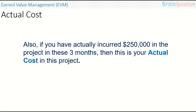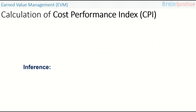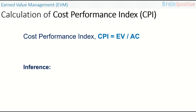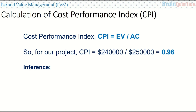If you have actually incurred 250,000 dollars in the project in these 3 months, then this is your actual cost: AC equals 250,000 dollars. From these three parameters — EV, PV, and AC — we can now calculate the Cost Performance Index, which is EV divided by AC. For our project, CPI equals 240,000 divided by 250,000, which equals 0.96.